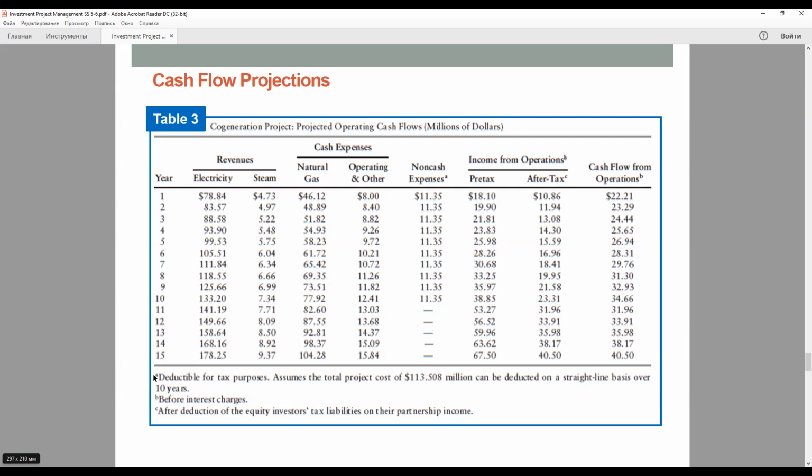So if you have several scenarios in your financial model, that means that switching from one scenario to another leads not only to changing one set of drivers like inflation, but also all other drivers.